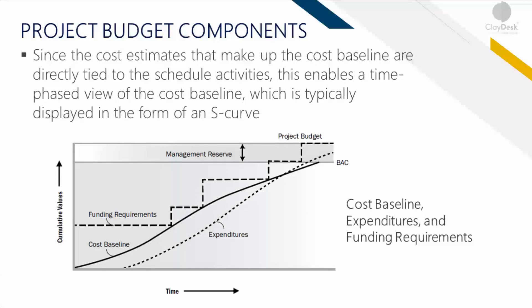Here are the budget components. Since the cost estimates that make up the baseline are directly tied to all tasks, subtasks, and activities, this enables a time-phased view of the baseline, which typically looks like an S-curve. Cost based on expenditures and funding requirements are listed on a graph — cumulative value on the Y-axis and time on the X-axis. As time progresses, your funding requirements increase based on the total budget.